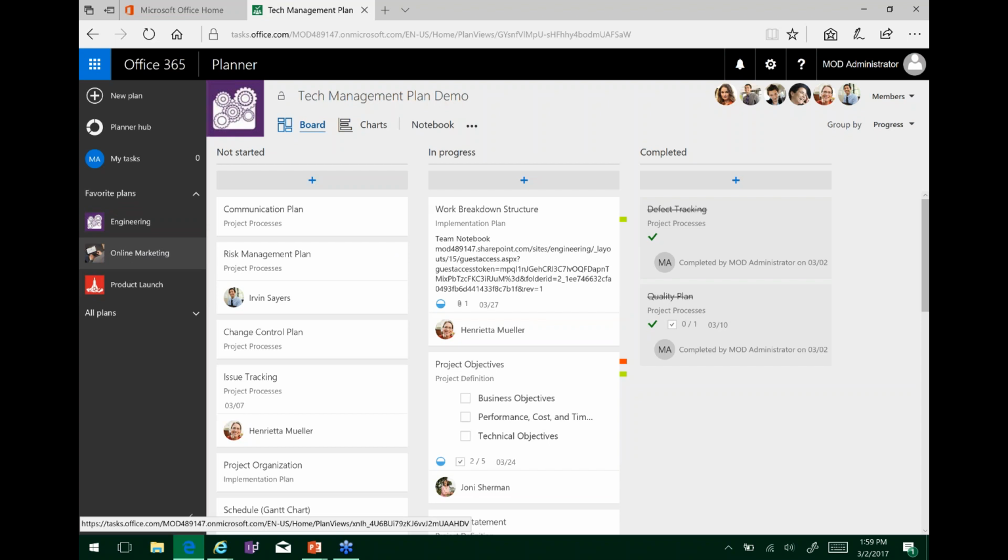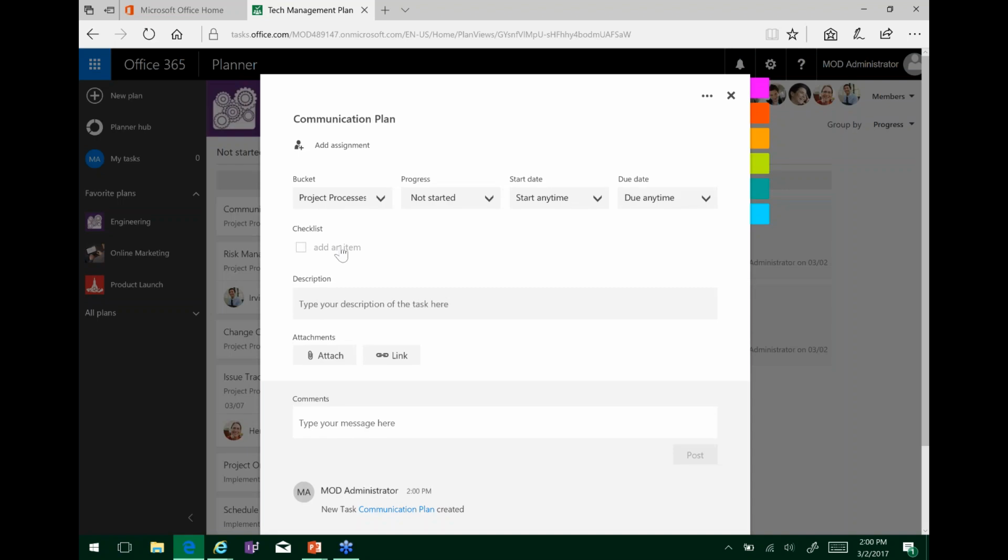Okay. Can you track cost in this planner? You could set cost up. Now, you're not going to be able to calculate it here because there are no form fields for calculations, but if you wanted to do it informally, you could set some sort of checklist item that you wanted to track that way so that you could watch budget items change over time.